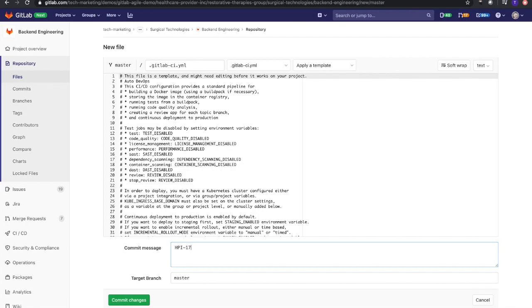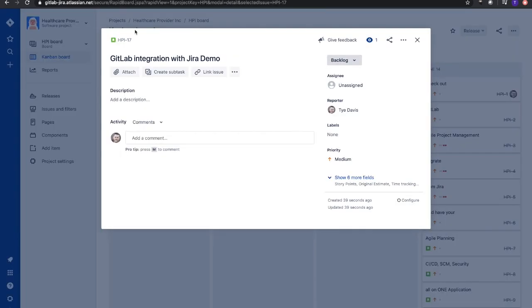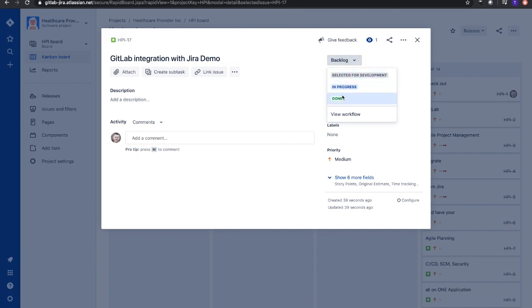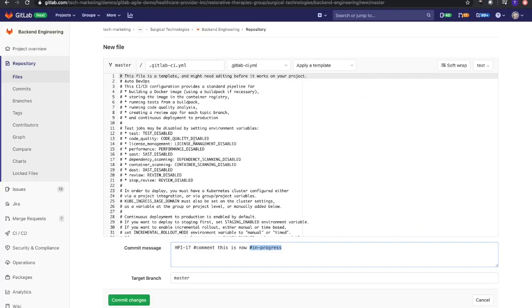I'll lead with HPI-17. I can add a comment that will help with the transition. What this is going to let us do is take this transition 'In Progress,' and once it's committed, it's going to move this from Backlog to In Progress. These are just the three default transitions I have set up here. Maybe your workflow is different - just make sure that it's exactly how you have it built out. I have the pound sign and hashtag 'in progress,' and that's what I set up inside my commit message.